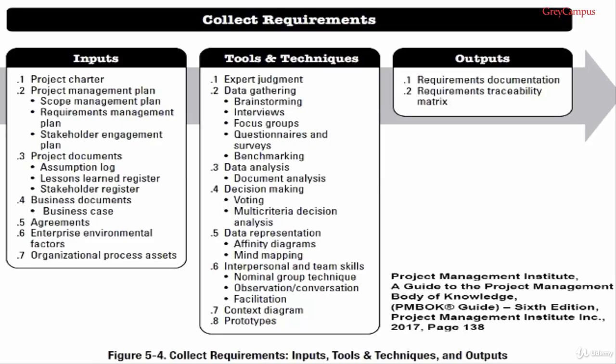This is usually just one or more interviews talking directly with stakeholders individually and asking questions from a script, as well as extracting information. This technique is also useful for detecting and eliminating misinformation. And when used correctly, especially one-on-one, it helps reduce fear in the subject, especially when the information is confidential or potentially harmful. This way you can elicit information that would not be revealed in an open forum.